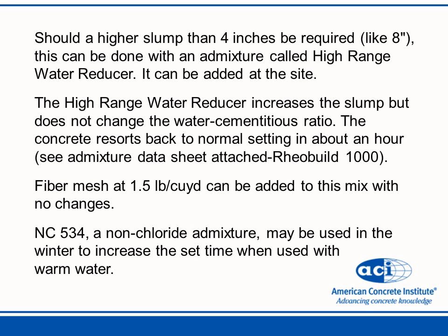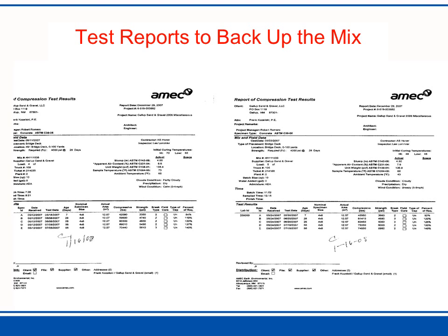This way it eliminated the need for another mix design for the winter. So we had everything covered, winter, summer, fall, for the job site, so we did not have to redo mix design submittals. Then we would have some backup test reports for the mix.